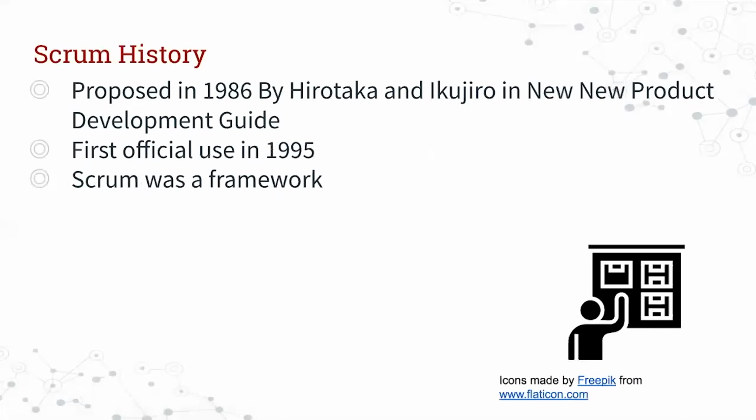One of the big things about Agile is creating those iterations where you're repeatedly going over every 4 weeks in a sprint, and you're repeating what's been done, what still needs to be improved. And in each iteration you're improving the product, you're adding more features, you're making sure that something is delivered at the end of every sprint.